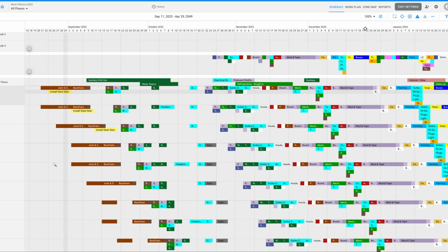And I do want to say something. There are people in the tact world that think you need to put it into wagons, but the truth is in multi-train tact plans, you can have different rhythms. So you see this is on its own tact time, its own tact time, its own tact time. Gypcrete is on its own tact time. Then this is the remainder of the building, and then you have a standard tact time, right?